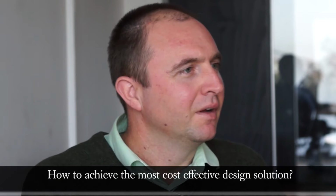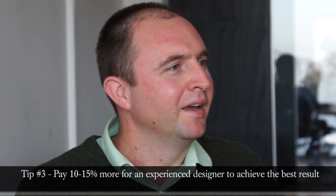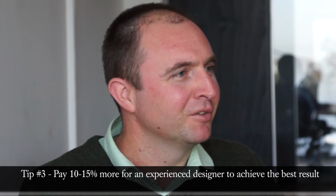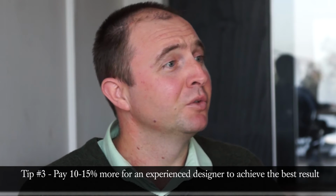Designers, again, a very important piece of the puzzle. If you come up with a design that's already efficient, then you're going to have an easier time getting it built. It's much easier to find a designer who has good design already as part of their skills, rather than trying to find an average designer or a cheap designer and trying to get them to come up with a cost-effective design. You might be better off paying 10 or 15% more for your design, because you're going to save time during planning and you're going to save costs during construction.